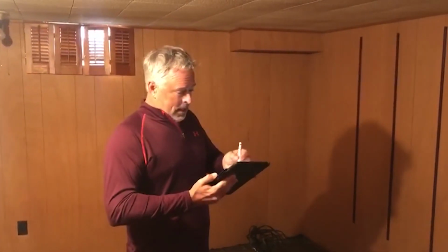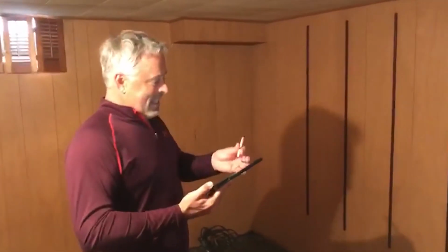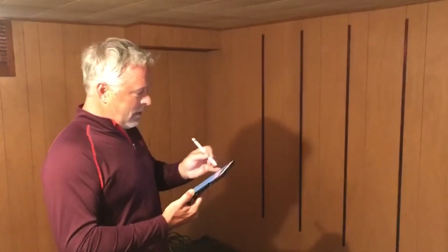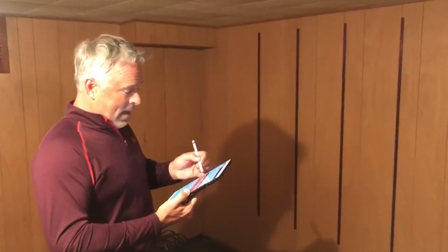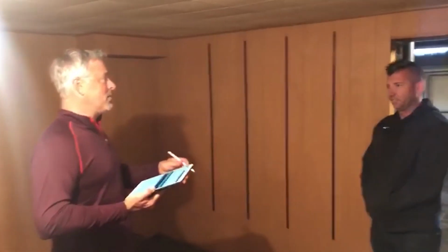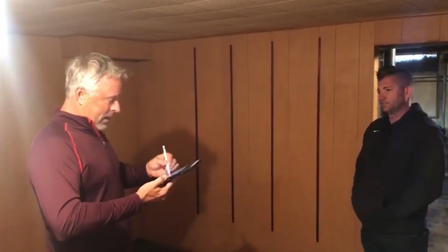So honestly, if we throw in a final cleaning on this house, I'm at $31,583. You can't disagree with the fact that we're going to replace switches and receptacles. Going through the interior, we've got to paint the whole place, do flooring in the whole place, put new granite tops in, plus appliances, plus 11 windows. Or wait, it was 9. So it adds up quick, and those are numbers that are tight. And you're still at 30 grand. If you think you're going to come into this house and spend 15, 20 grand because it's small and clean, the numbers add up real quick, and you can't dispute anything that we've done.